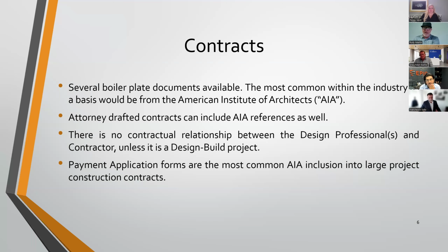We'd be more than happy to add a price. But that scope of work is going to clearly define exactly what we've been hired and what we've bid to do, which is A, B, and C. If D needs to be done at a later time and you see that, then you could go ahead and talk to them. But all of that is very crucial, and that's why a whole team is important to making sure that this gets done correctly.